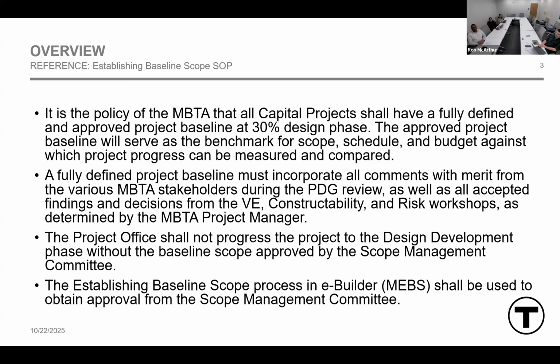We are expecting that at that point, after all comments, PDG comments, value engineering, constructability, and risk comments are addressed in the document, that's the document that will be submitted. So it will be going out the phase just right after we're finished with the review, and there's a period of time for the incorporation of all the comments.